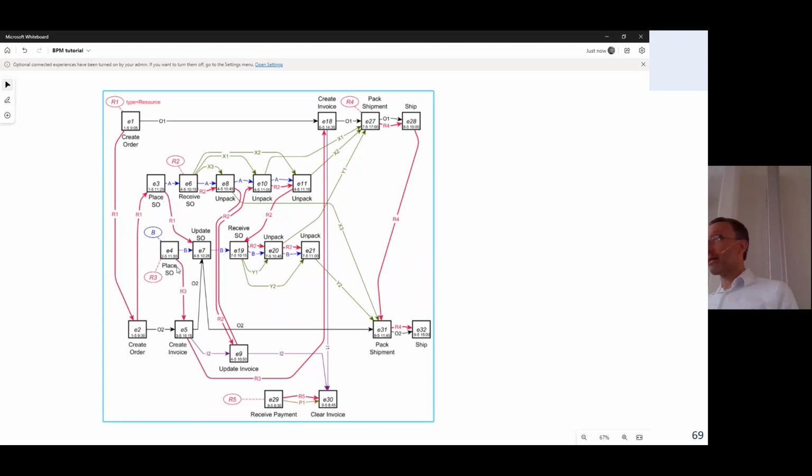That is one of the things, right? So maybe now that I've added edges, the availability or non-availability of an actor explains why certain things didn't happen. Before we just looked at the objects, but if you have one key actor who's the only person who's allowed to do certain things and he's busy over there, then he's the cause of the delay. And you will never see this if you just analyze the delays along your items or objects.